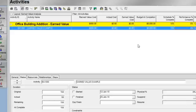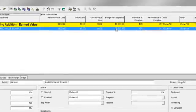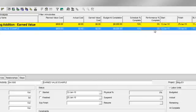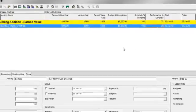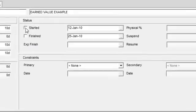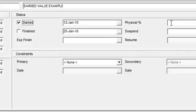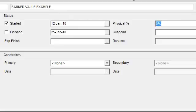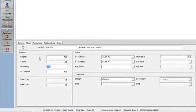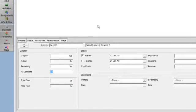Let's now demonstrate the calculation of actual and earned value cost. Earned value cost is the value of work performed as of the data date, calculated by taking budget at completion times performance percent complete. Let's status this activity. I'll come down to the status tab and notate that the activity started on January 12. I'm now going to report my percentage of completion — physical percent complete is 25% — and I'll report that I've got eight remaining days of duration to complete this activity. I'll now go to the resources tab.